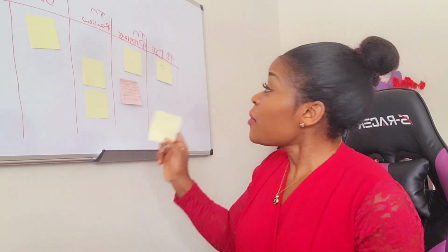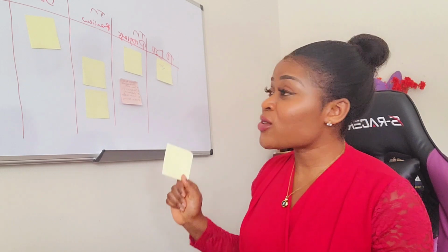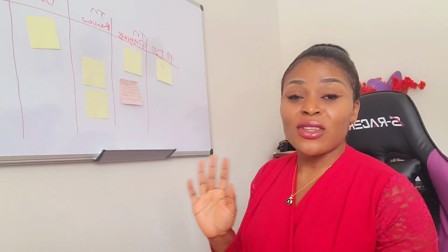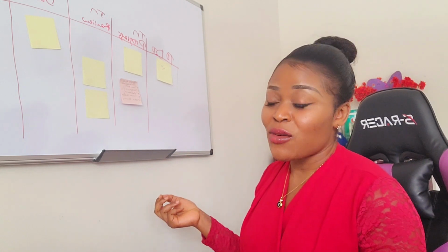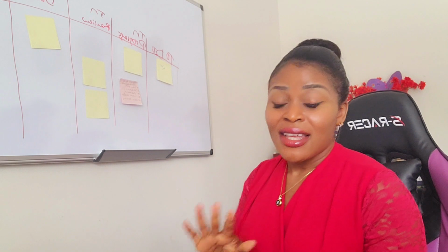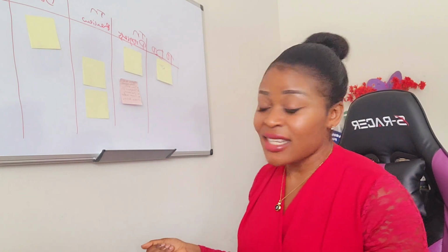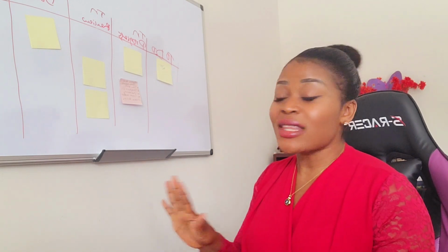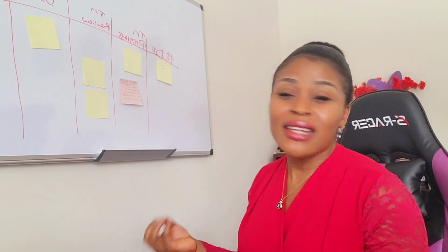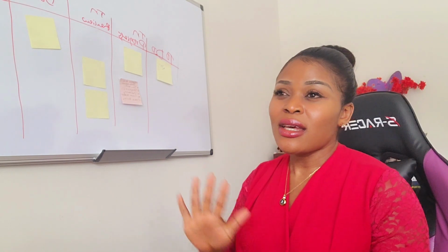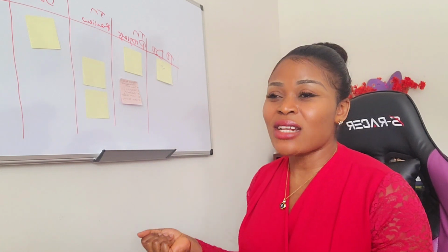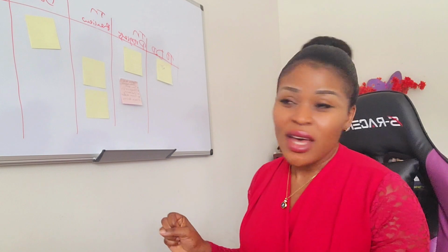So normally, according to the previous Scrum guide, when you're facilitating a daily Scrum, your focus is on 3 questions. What did you do yesterday? What do you plan to do today? And do you have any impediments? That is the standard way to facilitate a daily Scrum. But now, this whole thing has been changed because I guess they've seen that it's not that effective, because team members tend to treat it as a ritual instead of really reflecting the purpose of a daily Scrum.